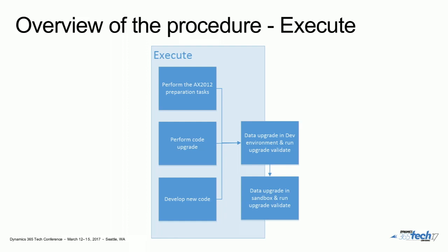Once the code upgrade and the preparation tasks and the new code are done, or in a relatively complete and functioning state, then you can run the data upgrade. Run the data upgrade in a dev environment first, and then you run it in other environments. And I'll talk about that in a bit more detail in the following slides.